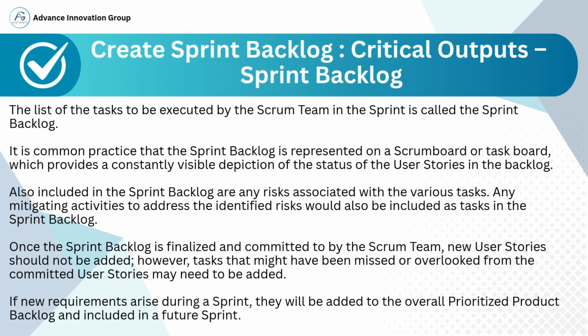Another critical aspect of the sprint backlog is the inclusion of risks. Any risks identified during sprint planning are added to the backlog, along with mitigating tasks if applicable. This ensures that risk management becomes an integral part of daily work execution.